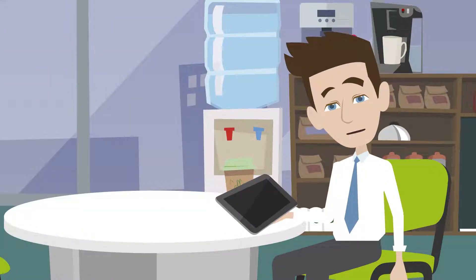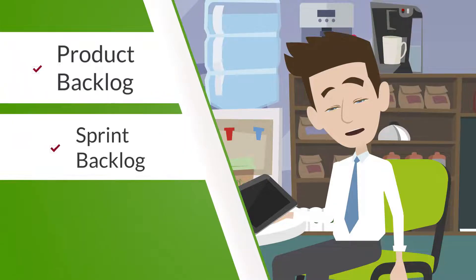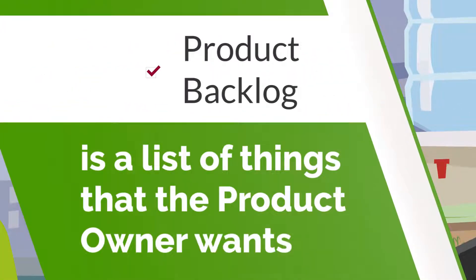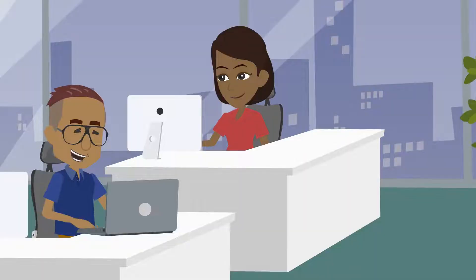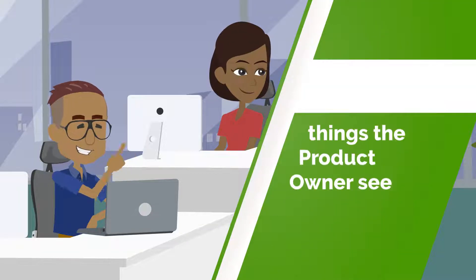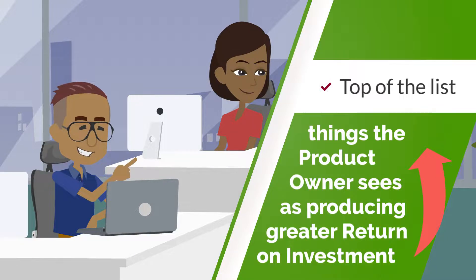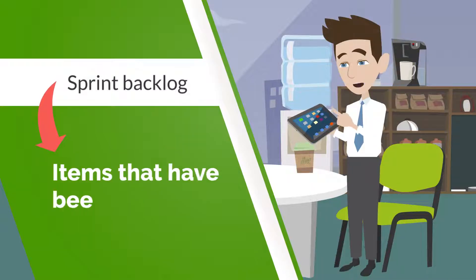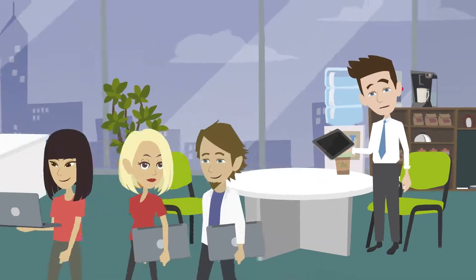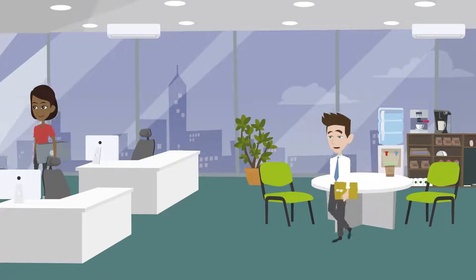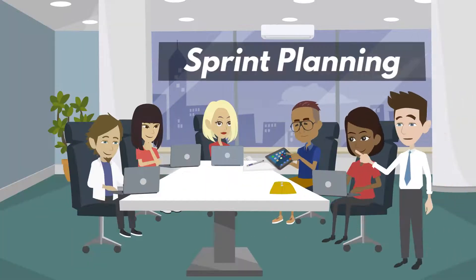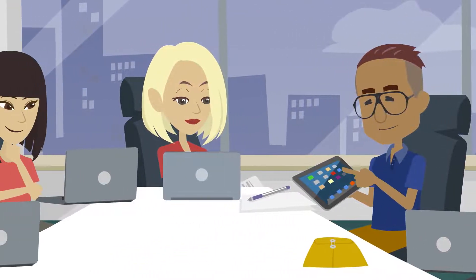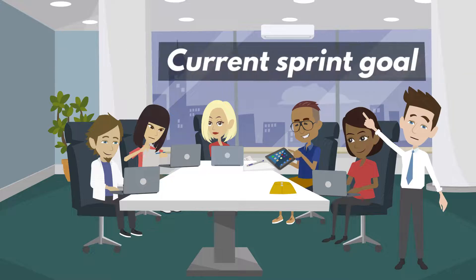Now let's look at the artifacts from Scrum. These are the Product Backlog, the Sprint Backlog, and the Increment. The Product Backlog is a list of things that the product owner wants or thinks they may want. In software, this is usually an ordered list of features with the things the product owner sees as producing greater return on investment at the top of the list. The Product Backlog is the source for the Sprint Backlog, which is the set of items selected for the current sprint. The Sprint Backlog is populated at Sprint Planning, and it helps keep the team focused on just what is needed for the current sprint without the added noise of everything in the full product backlog. The Sprint Backlog provides a great deal of transparency in understanding the progress being made toward the current sprint goal.